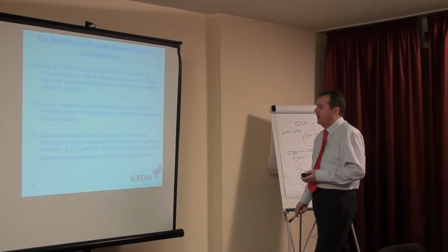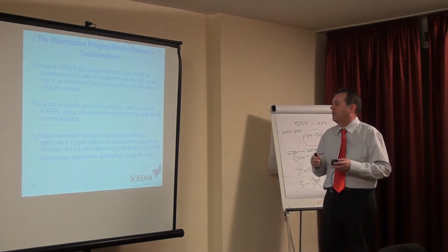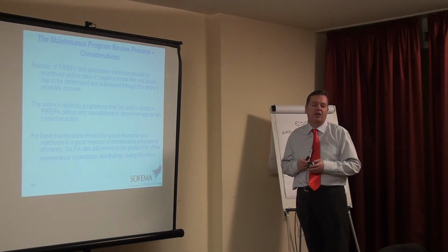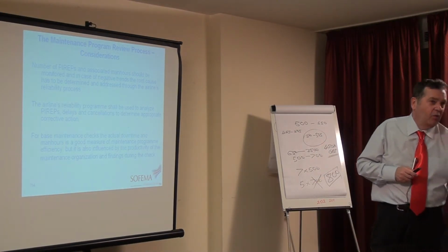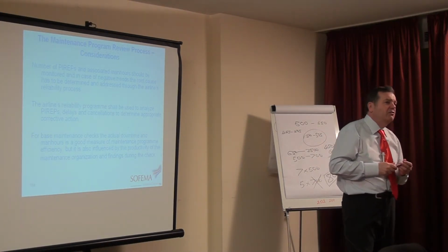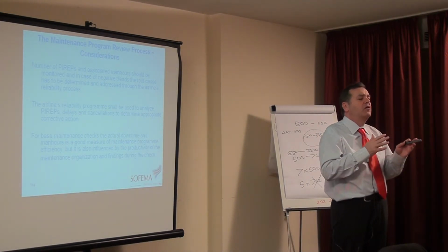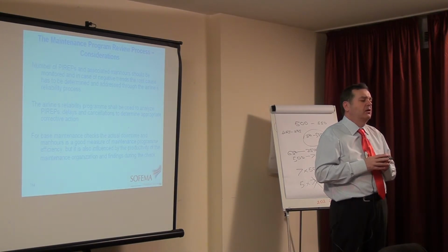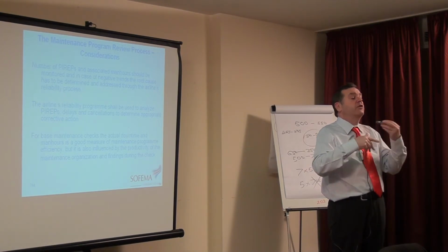For base maintenance checks, the actual downtime and man hours is a good measure of maintenance program efficiency, also influenced by the productivity in the maintenance organisation. I've seen a maintenance check with 6 days of radio and radar work last 30 days because of all the other activities.